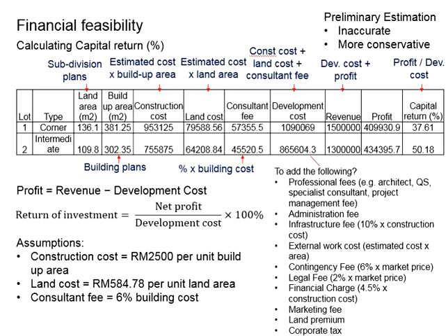Let's say your average capital return for the entire project is 40%. Dividing by 2 years, it will be 20% per annum. However, if it is divided by 3 years, your capital return will reduce to much lower than 20%. Now you will need to consider, under poor market demand conditions, is it worth the investment? This is about the financial feasibility studies.